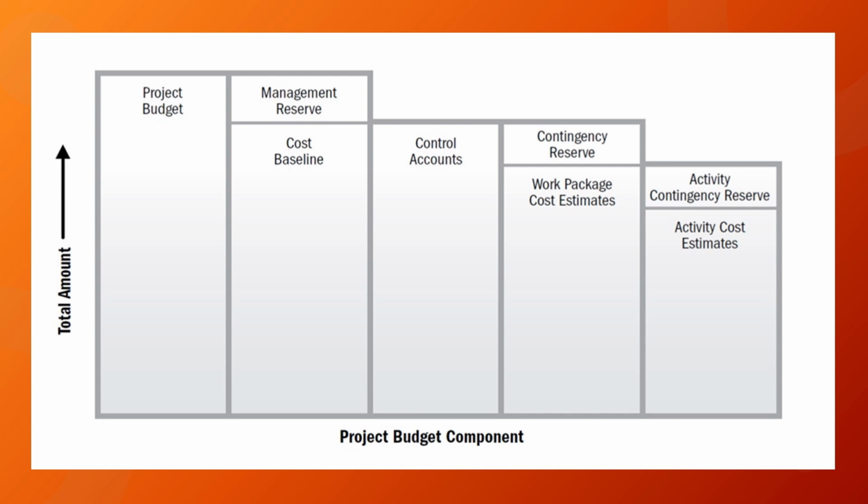Control accounts play a vital role in project budgeting by providing a structured approach to managing and controlling costs within a project. They act as centralized points of financial control that aggregate the cost of multiple work packages or activities. The purpose of control accounts is to enable accurate tracking, monitoring, and reporting of project expenditures.